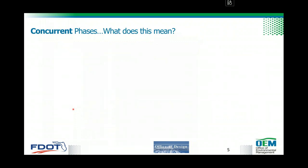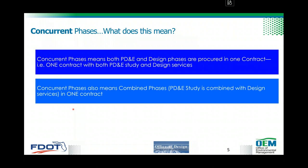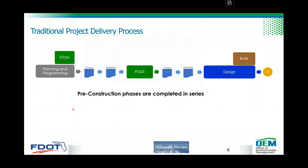Before we dive into the materials, we want to make sure you understand what concurrent phases means. In this context, concurrent phases means both PD&E and design phases are procured in one contract — one contract with both PD&E study and design services. Concurrent phases also means combined phases. What concurrent phases is NOT is a PD&E study with an option for design services. Many of you have been doing PD&E study with an option for design services for many years, but this standard scope of services is not that.